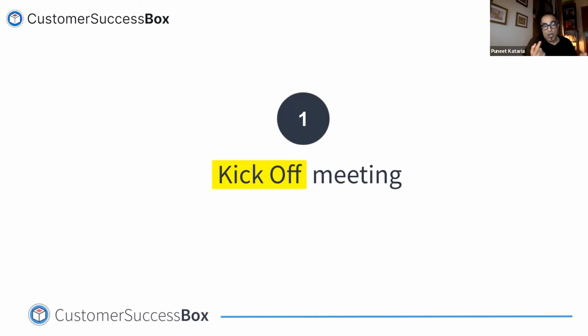Second, who will do this kickoff meeting? Even before you get into the kickoff meeting, we recommend that you go and have a handoff call with your sales team. Check with the sales team what the customer has purchased, assuming you were not party to that sales process beforehand. Sit down with the sales team, take down their notes, understand, learn from them what they've promised, what they've delivered, what they've committed. If there are any timelines, if they've promised the moon, then at least you need to acknowledge that and learn that.